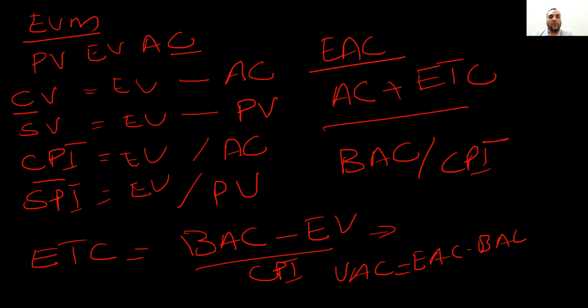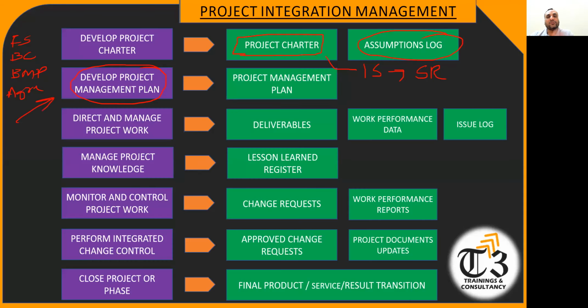So what you are doing actually, let me take you to the slides now. You prepare the whole project management plan. What is the project management plan? It contains 10 management plans. It contains 3 baselines. It contains the change management plan, configuration management system, governance. Everything is in the project management plan. You will submit the project management plan to the customer or sponsor. They will review it and they will approve it.